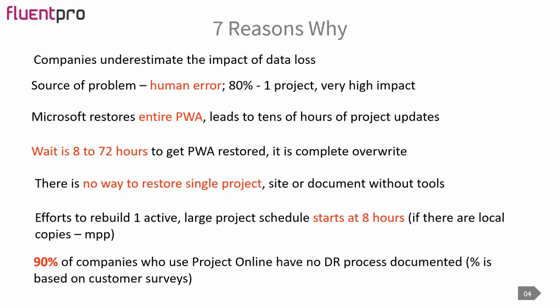You can work with Microsoft support, but that means that if you have 100 projects or 1,000 projects and you need to restore just one single project, that might impact other projects that were changed during that time. So this is not a good option. Usually you can do the entire restore in case of disaster, for example if someone deleted all the projects, and then you can restore it completely. But if you need to restore just a single project, that's not an option.